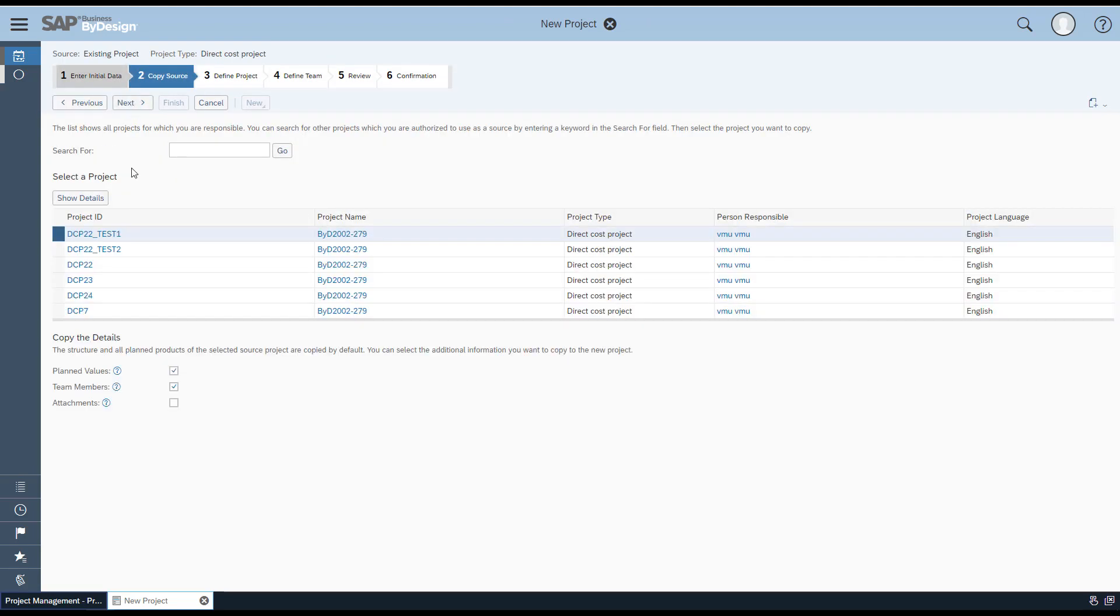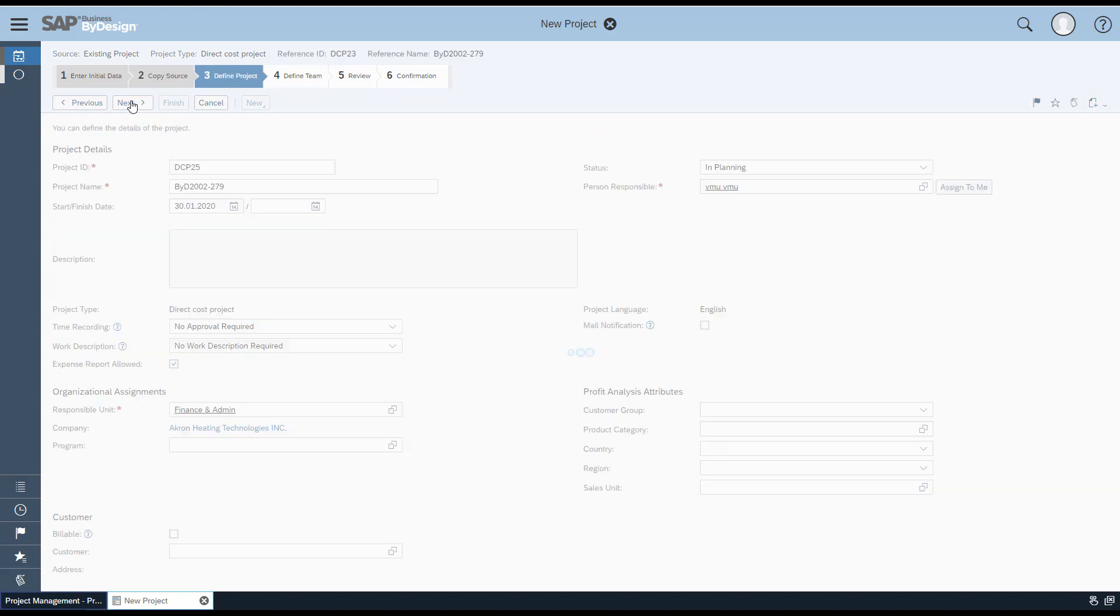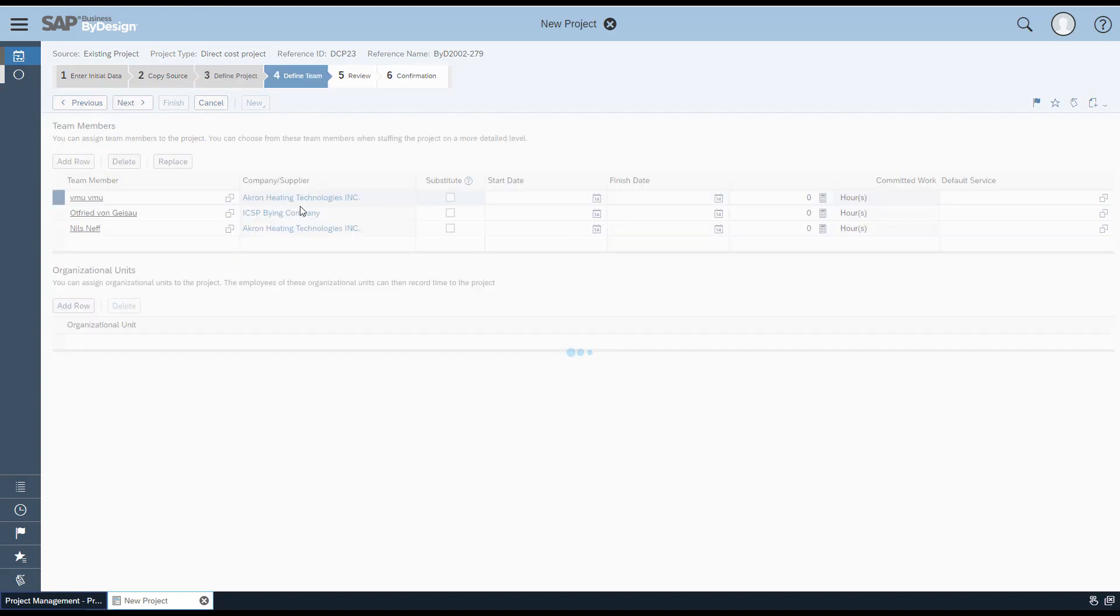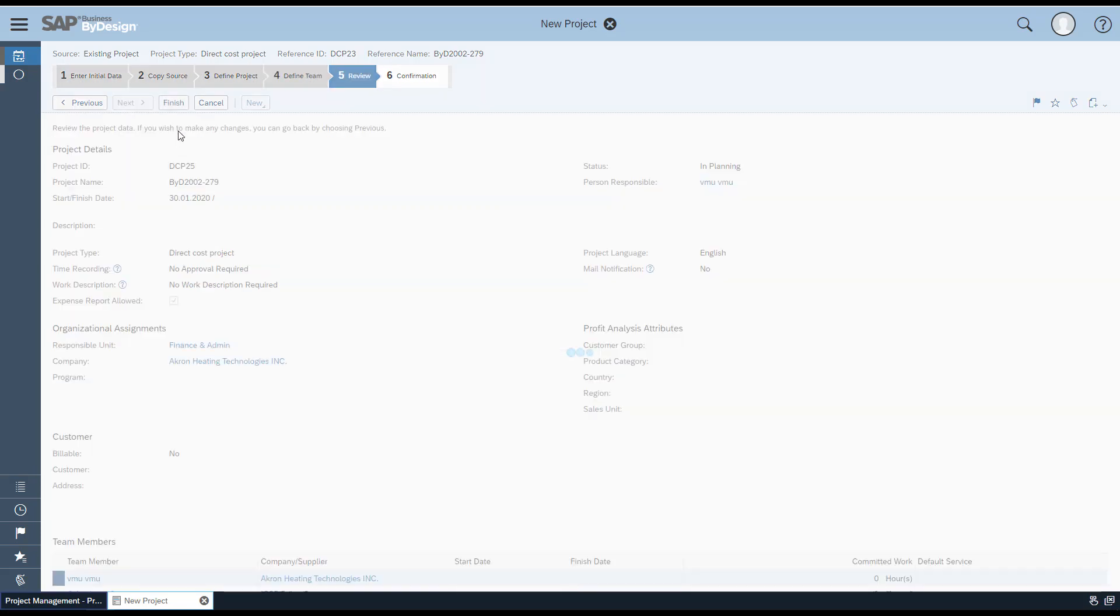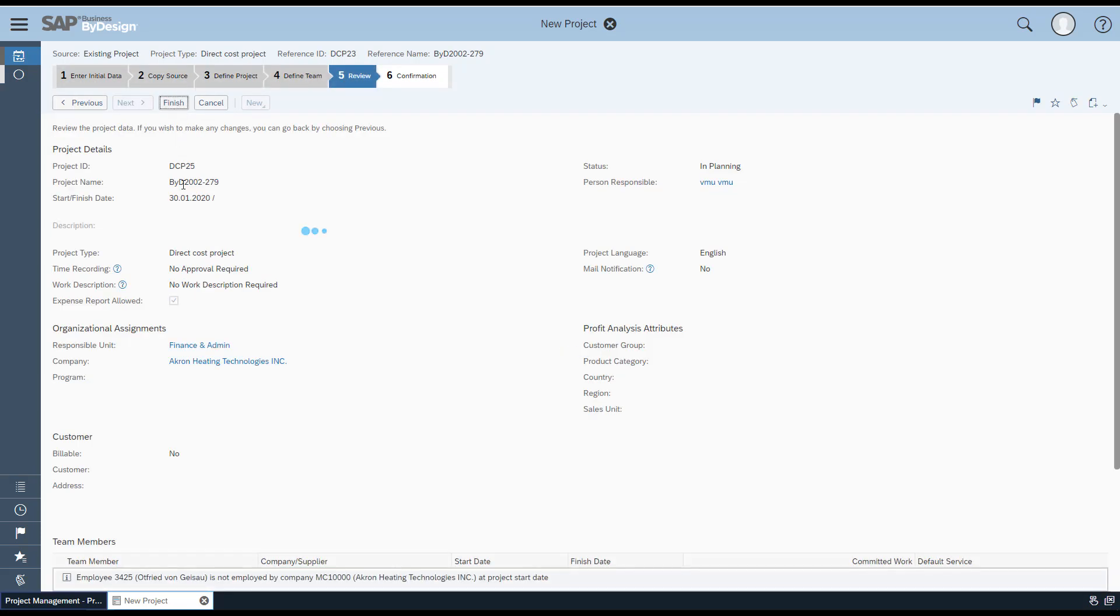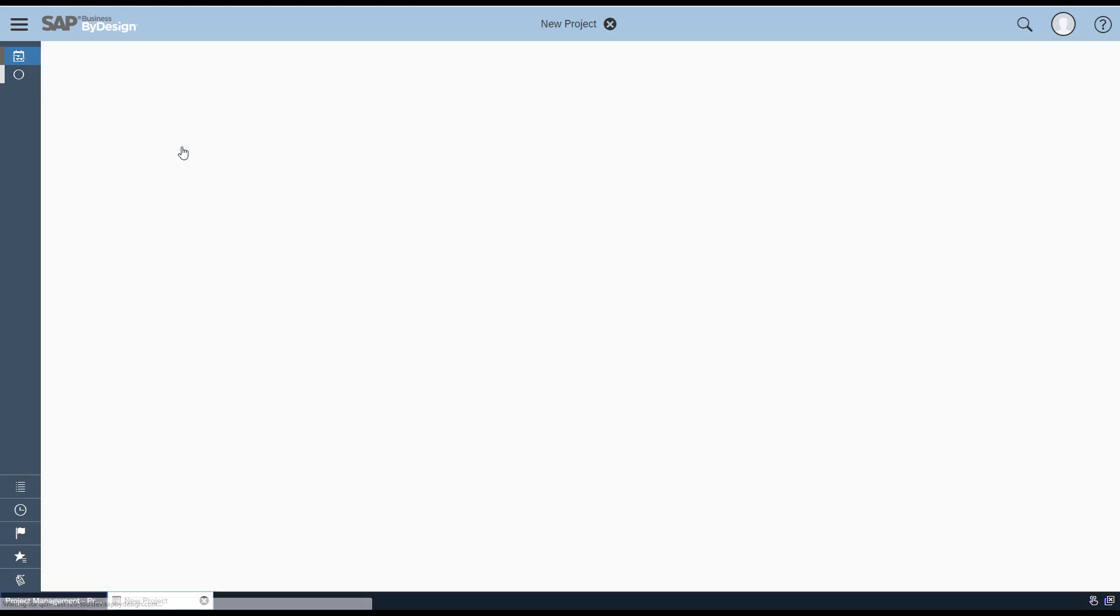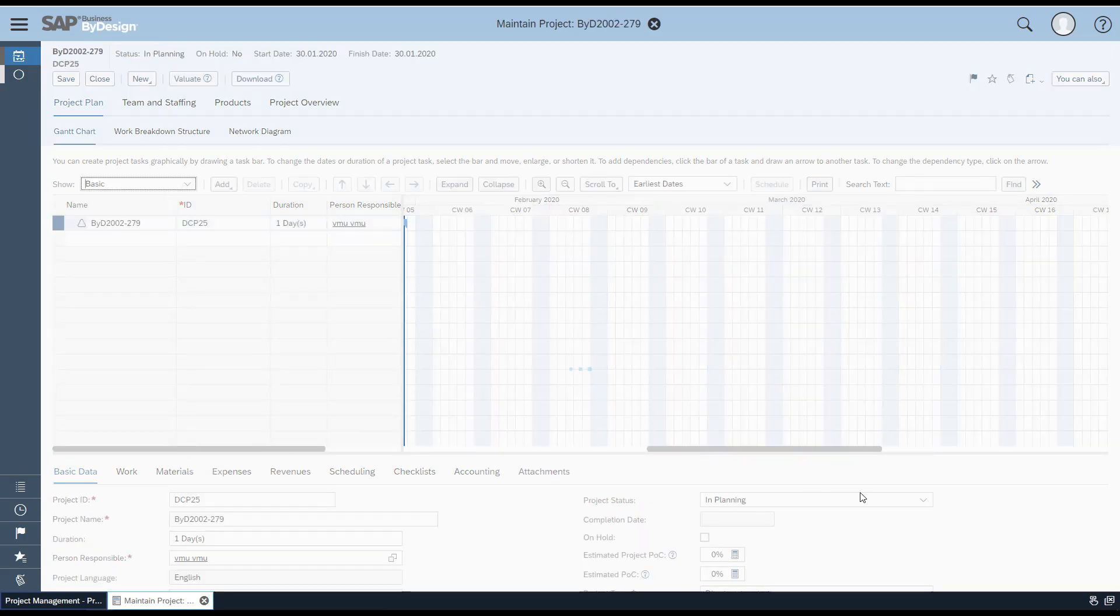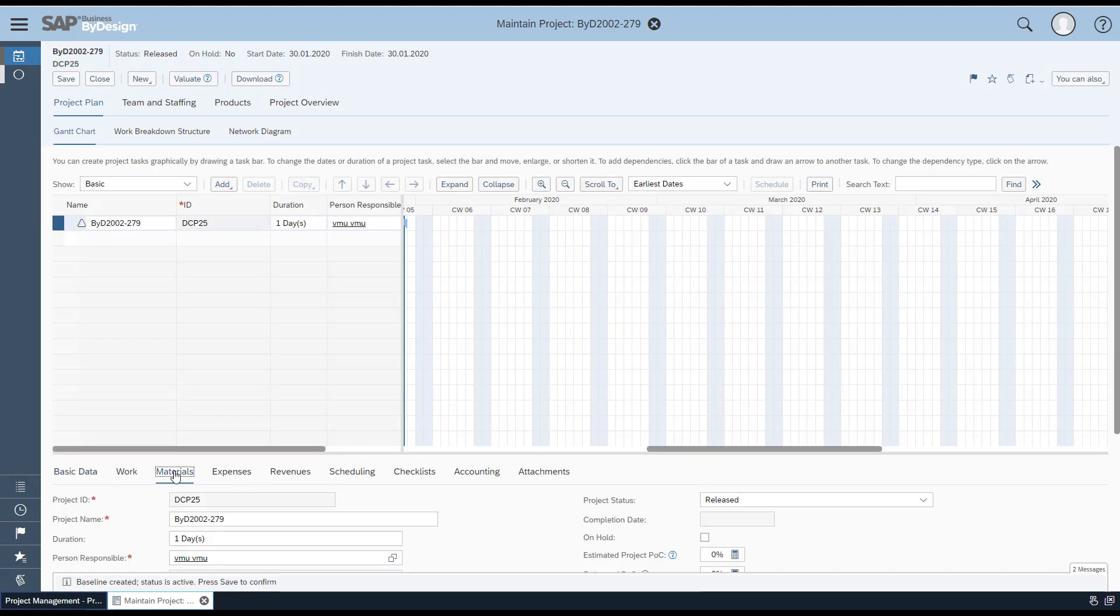Select the template project if required, then click Next. Enter the relevant information like project ID and name, click Next, then Finish. To edit, click on All Projects, navigate to Basic Data, and make sure the project status is changed from Planning to Start and Release.